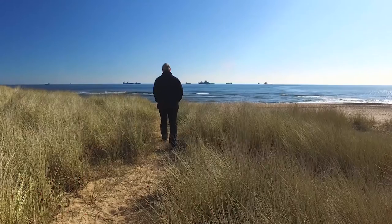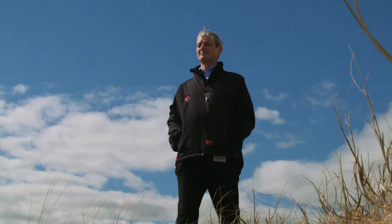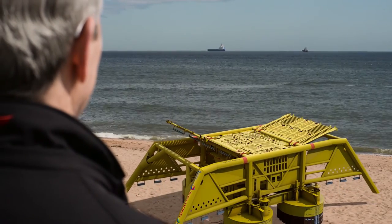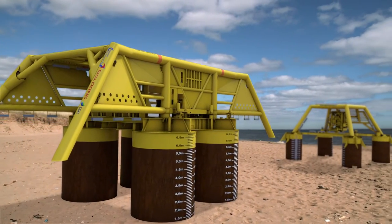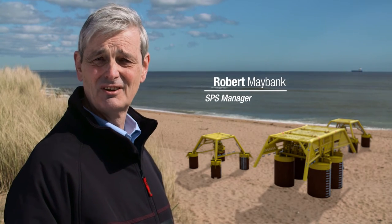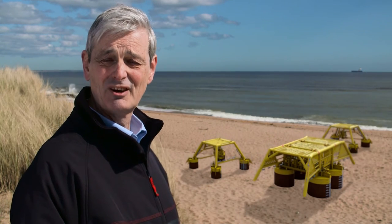The SPS package will deliver the seabed structures and one additional tree. The manifold is the heart of the drill centre, providing essential communication links, production and utilities, allowing remote operation from the Shetland gas plant. Having suppliers manufacture to the proven Lagan-Tormor specifications, the same equipment, the same tooling, the same procedures, is reducing cost and time.